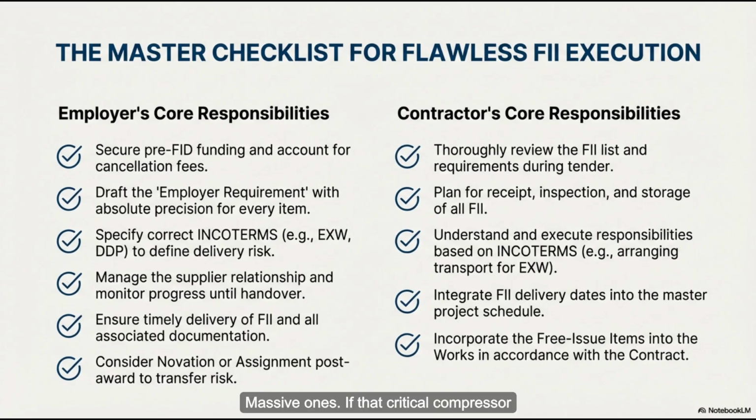If that critical compressor arrives 2 months late, the contractor has thousands of workers standing around, idle, and they will bill the employer for every single minute of that downtime. So by trying to speed things up, the employer has pointed a loaded gun directly at their own foot. That's the risk, yes. So how do they get out of it?